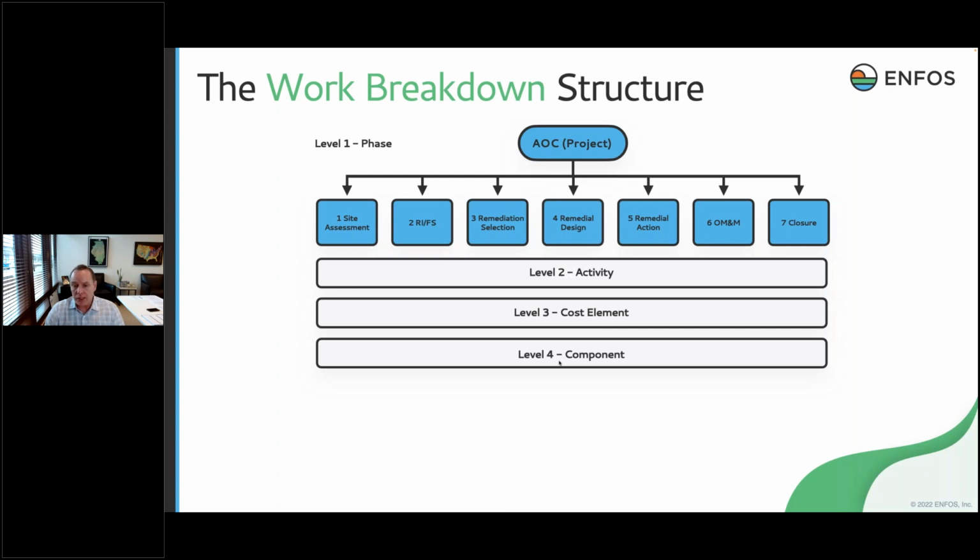The majority of our customers will standardize on a single work breakdown structure across their entire project portfolio. They do that to aid them in their forecasting for their reserve or provisioning, as well as their non-reserve work. So they use that for their forecasting. They also use it for their work commitments, as well as their spend tracking. And I'm going to show you some examples of that.